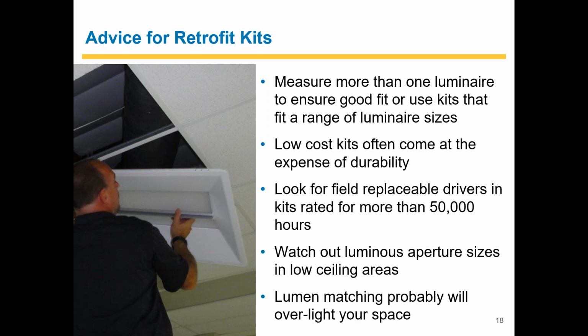And those fixtures are going to run 7,000 hours a year at this airport. They're in the main lobby. And so after 7 years, they would have had to have replaced all those drivers because you're getting towards that 50,000 hour deadline, and there's no way of doing the maintenance from the ground. So when those fixtures have to get replaced or serviced, you're either cutting access hatches into the ceiling at 30 feet high, or you're ripping out the drywall to put in a new fixture. Both cases, very expensive activity. We want to make sure that doesn't happen as part of our projects.